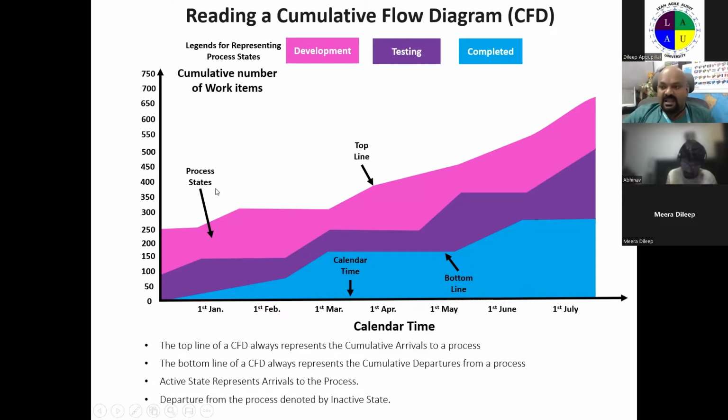And now, when we look at here, this line is straight. That means no new work. The development team has not pulled any new work. We can also assume that the development team has been helping the testing team. It is one scenario; it can be anything. That means, which is good actually, the team is cross-functional. Collaboration is more, which is very good.